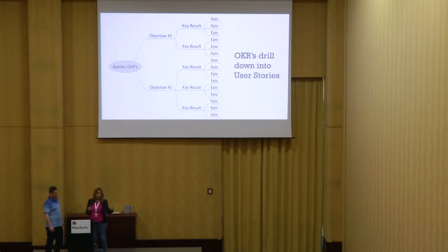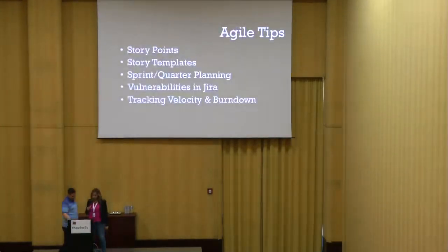So we actually know we're going to get our OKR done because we do this whole quarterly planning thing. This came from a suggestion from our Agile coach, Jason, who said, you know what? Dev teams do release planning. They decide which features are going to go into it. That's similar to what we're doing, we just call it quarterly planning. That was a really good lesson learned for us.